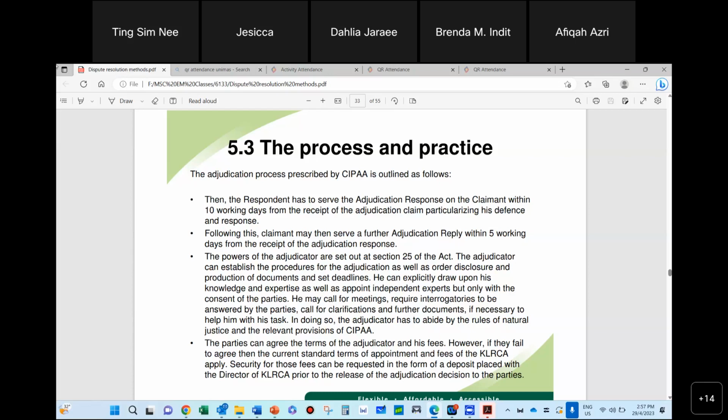And that's why all contracts state to go for arbitration, not court. It does not mean that when you state that you're going for arbitration, you have no right to go to court anymore. You still can go for arbitration and then go for court if you're not happy with the arbitration process. So whenever things are stated in a contract, it will always be go for that first, you see, unless there are condition precedents that you can go for adjudication. And of course, if it's a payment case, especially a CPA kind of thing, then you can straight away go for adjudication. Okay.